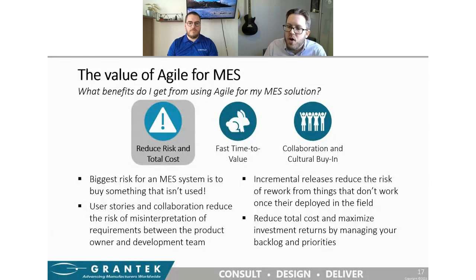Now, one of the challenges we all face in systems integration and manufacturing programming is that we're writing software that needs to work in the physical world. It can be tough to develop a solution off-site just to realize it doesn't work quite as expected when you need to apply it to the real world. I'm not saying that Agile totally solves for that risk, but it certainly reduces it by making sure deployments happen early and often. Finally, it gives you as the customer more control over your total cost and anticipated returns. You get to manage the backlog to make sure that your highest value priorities are taken care of first, maximizing your investment.